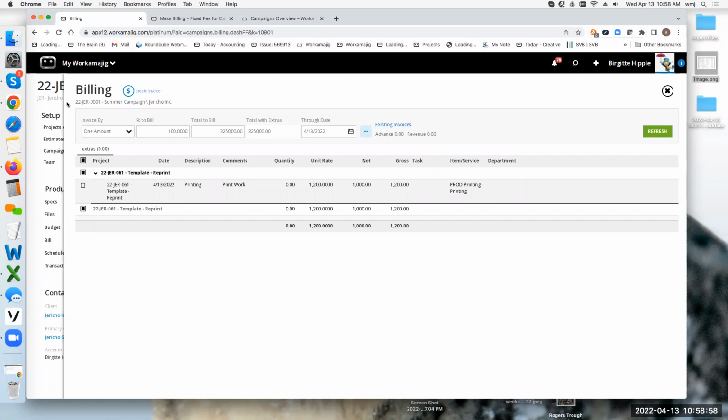Like, I know that I need an account manager just to manage different things for 5 hours, every month or every week, and I just need it to show up in the staff schedule screen. That's really what the planning project allows you to do, set up those allocated hours when you don't actually have a project yet. And then of course, as you add projects, it can reduce those allocated hours. So that is the one thing missing from campaigns.